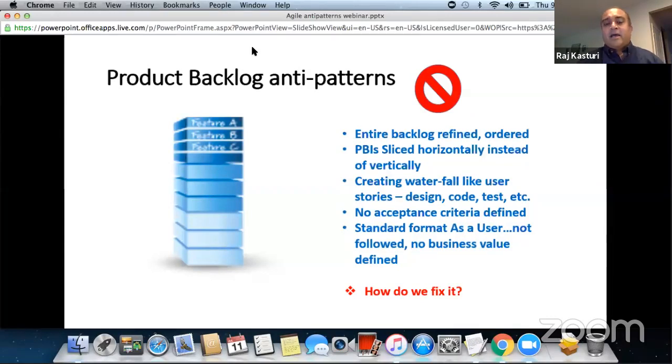You say, let's just have enough product backlog refined for the next 2 sprints. Focus on the next sprint, but also have a few more that are important and order them for the second sprint as well. It's not that you're going to use them, but in case priorities change during sprint planning, you can just swap those and put that product backlog item in the next sprint, right?